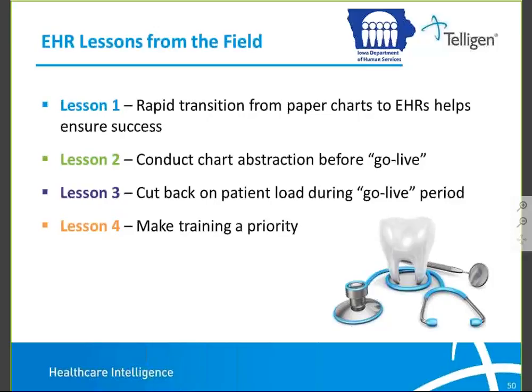There have been some lessons learned from the field. Again, EHRs have been around for quite some time now, very strong in the last decade or so across primary care. And so there are some lessons learned that have come forth over the last years, straight from the field. Number 1, rapid transition from paper charts to EHRs helps ensure success.